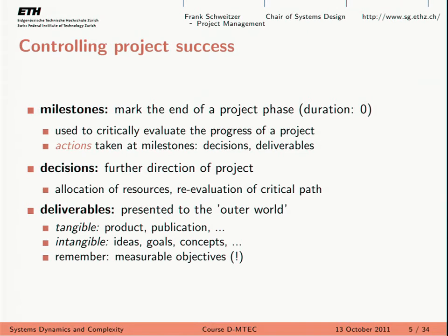But the milestone is simply a decision point. It's simply a checkpoint. And for now, let's imagine we put the milestones between each phase, although this does not have to be the case. Two things happen at a milestone. You produce some report outlining what this milestone has achieved, and then you make a decision based on this report, or deliverable.